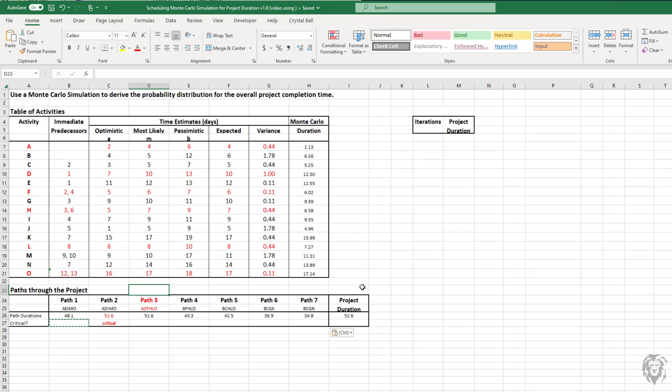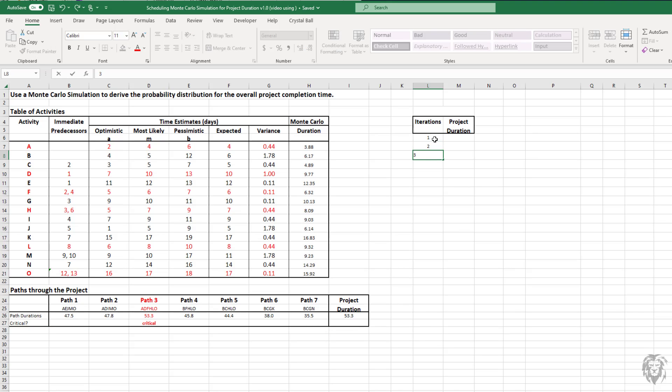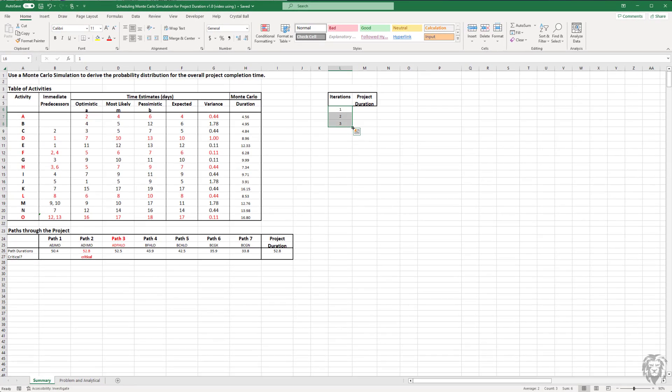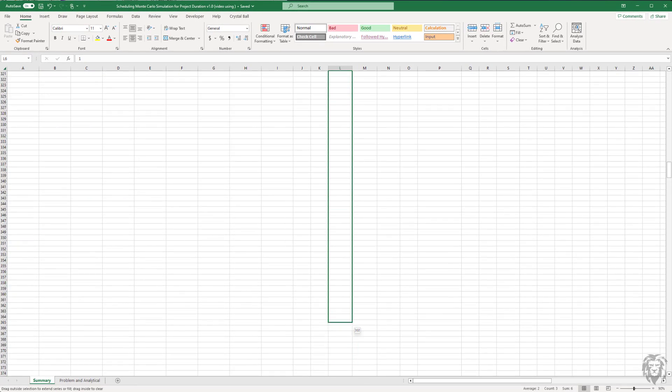Now that we've got this all set up, really it's just a matter of setting up a data table using the what-if analysis that Excel has. We should be able to do a Monte Carlo simulation for this and then get the feedback as to the distribution of uncertainties around the project duration. Our project duration is 52.6. Let's set up our table here. For demonstration purposes, we'll use a thousand iterations, not very many when it comes to Monte Carlo simulation. We'll set up our iteration labels, and I'm just going to carry that down for a thousand.